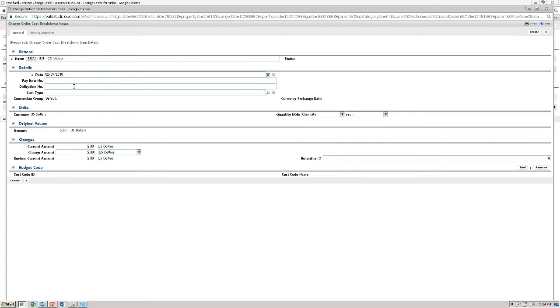change order video. In the date field, put the date the SF30 was signed. It does default to today's date, so please update that if necessary. Enter the pay item number, in this case P0020-001.